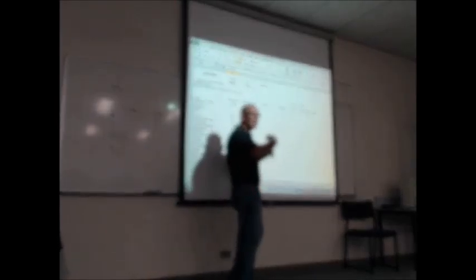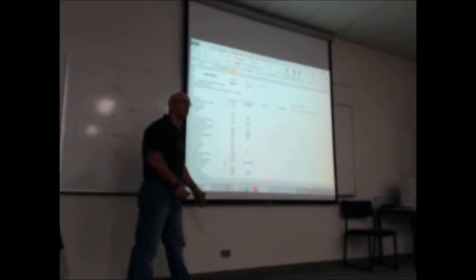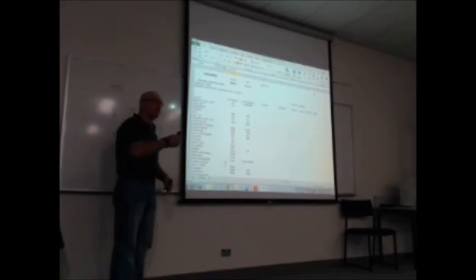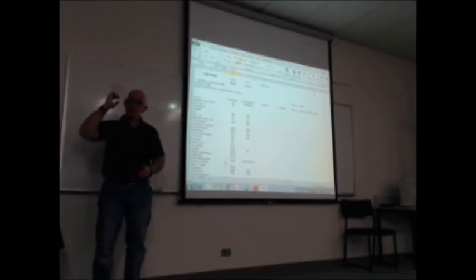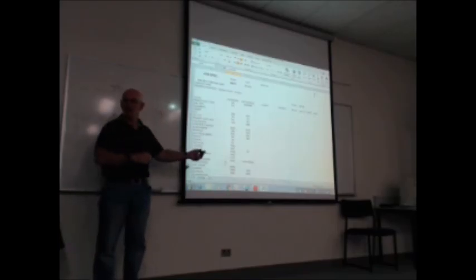Later on down the track when you're actually using it, that's your profit and loss. It's in some record, so you have a track record going. If you're using all those cost centers to work everything out price-wise, you will not miss anything. Oh, okay. So our final prices on every bit will be in this one. So just the final price of each cost center. So that's what you want us to fill out pretty much.